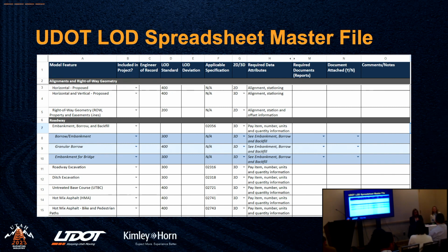The second one was just, is there any QC set in place for making sure these attributes are being filled out, or that you didn't forget the package itemized? I think that's where the reports are really helpful. We didn't specify how they have to QC, but knowing that you can run a report of all attributes is a really good way to QC. And then you can compare the quantities.